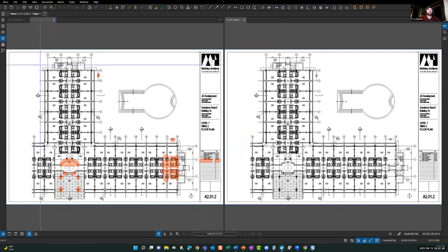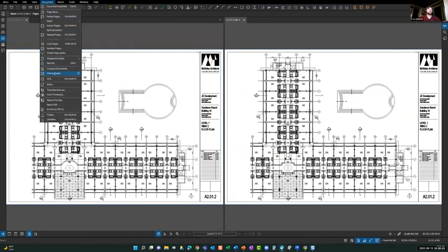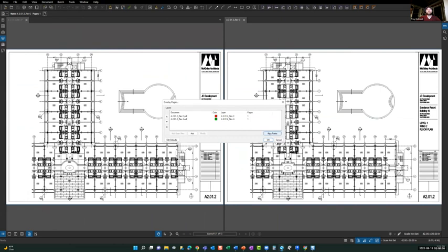You will want to calibrate, because right now it's looking at the piece of paper corner to corner, and it's going to line those up. And like I said, if somebody moves this plan over 1/8 of an inch on the piece of paper, now the whole thing is bad. And if I do the overlay pages here, we have the same option to align points and pick those 3 points to calibrate those.